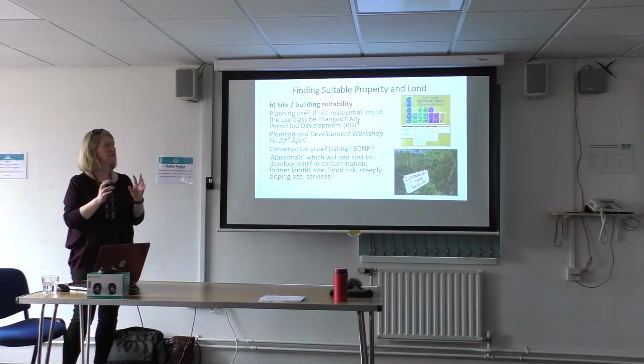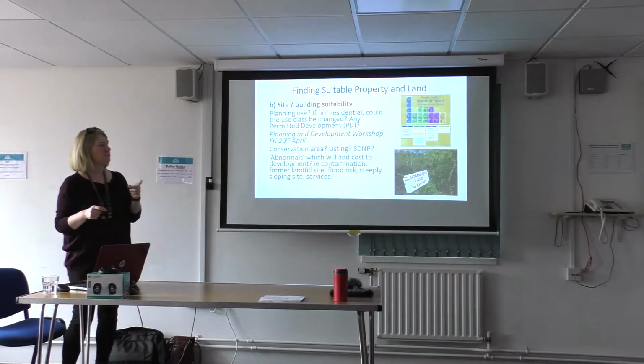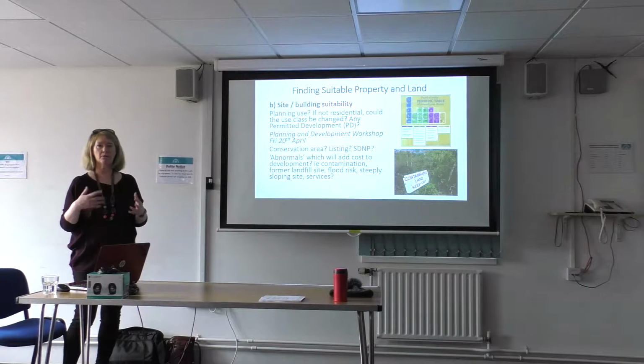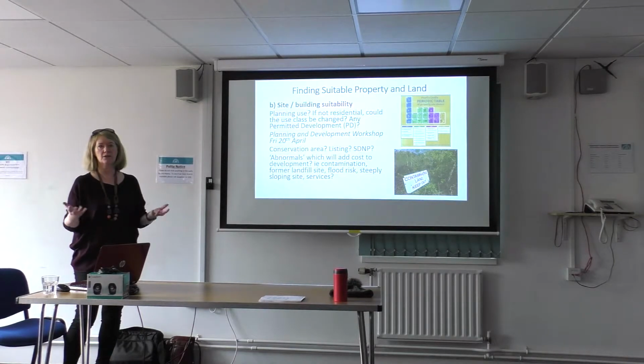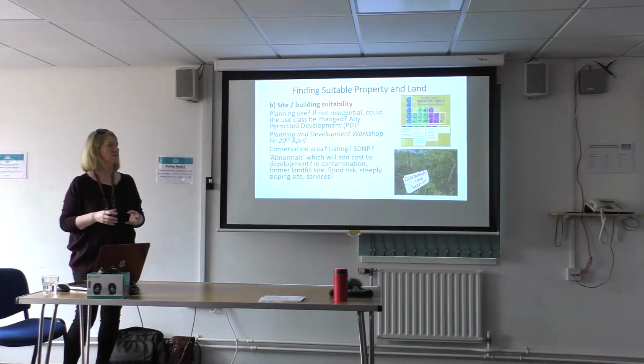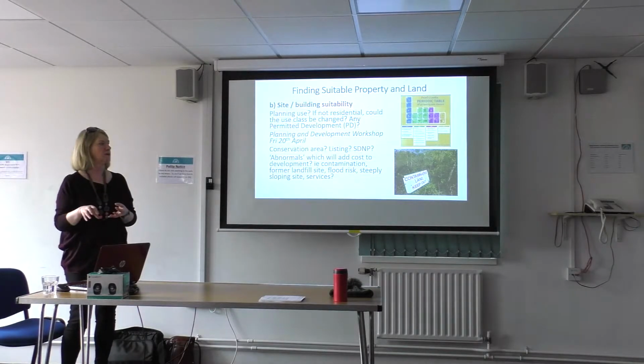Normally, if you want to change a use between one use class and another, you would need planning permission. It's sometimes quite difficult to get. But there's permitted development between some. And the government have brought this in to try and free up buildings that are empty. So quite a lot of offices and shops are empty. Why don't we use them for housing? That's the government's view, and I think it's quite a good view. So we're sort of repurposing certain use classes, certain buildings that have been designed for one thing into another.